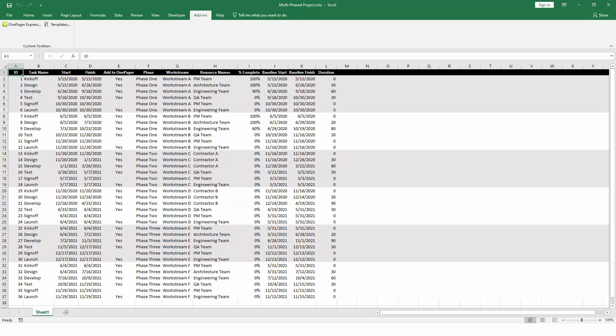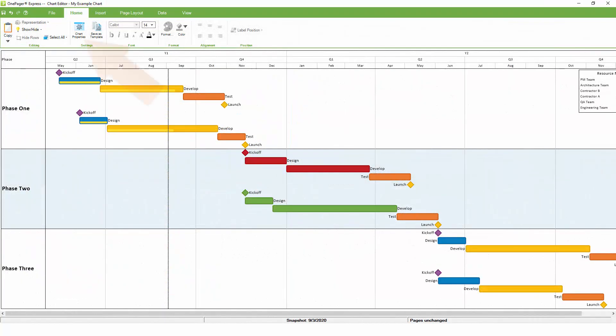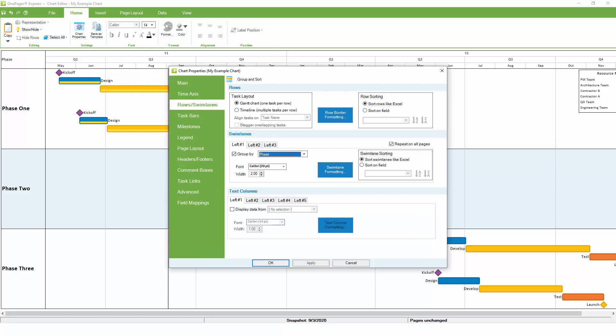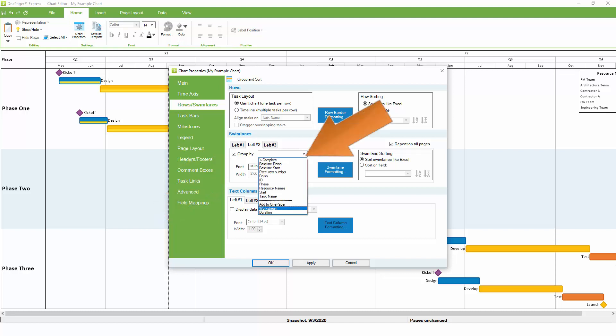Back in Excel, notice that we also have a field that tracks the workstream. In this example, there are multiple workstreams within a phase. We can use the workstream to create a second level of Swimlanes in OnePager Express. Return to the Rows and Swimlanes tab and click on the tab for the second level of Swimlanes. In the dropdown, select Workstream and click OK again.